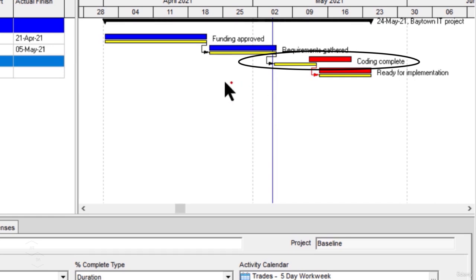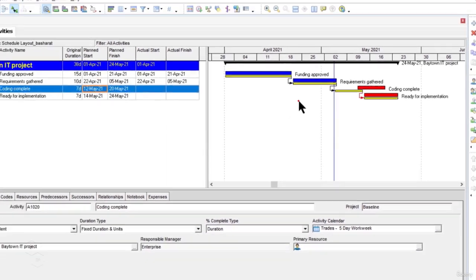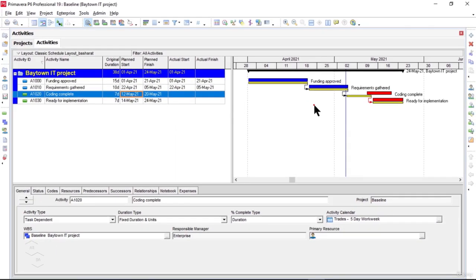So in other words, if a certain activity is aligned with the baseline, then we'll say that the activity has no variance and is executing exactly as planned. But once you see that there is a difference between the baseline bar and the actual implementation bar, then you will say that you have a variance. And then immediately we'll start tracking the activities that have variance and find out the root cause, then understand exactly what is happening and work to eliminate the impact on the project finish date.